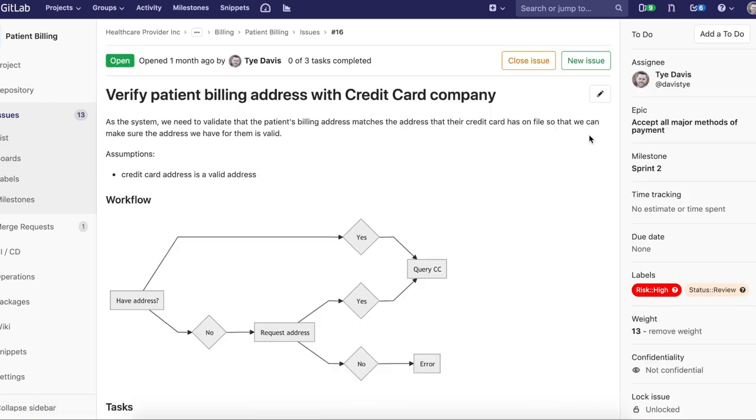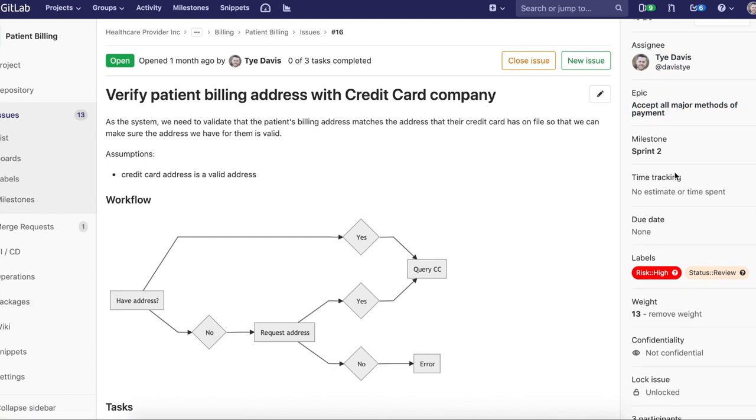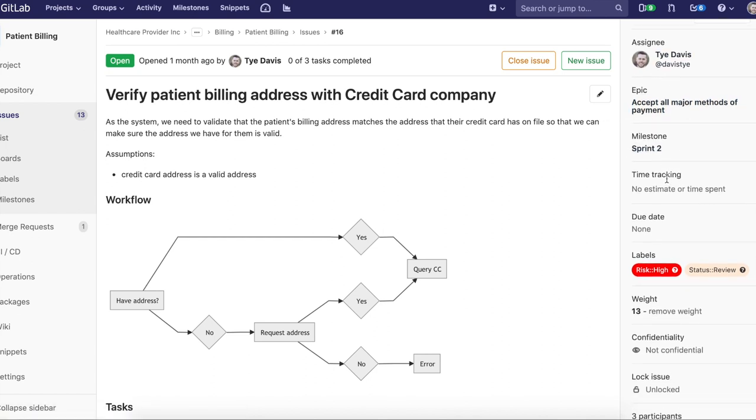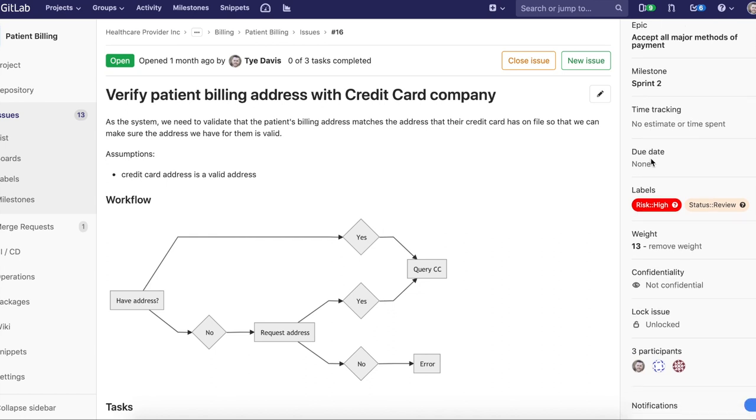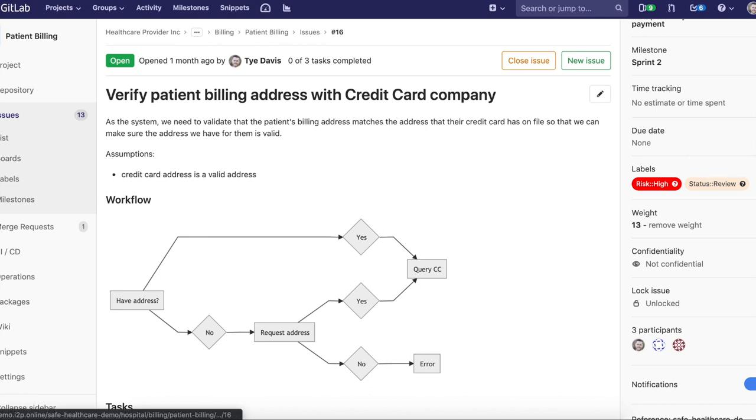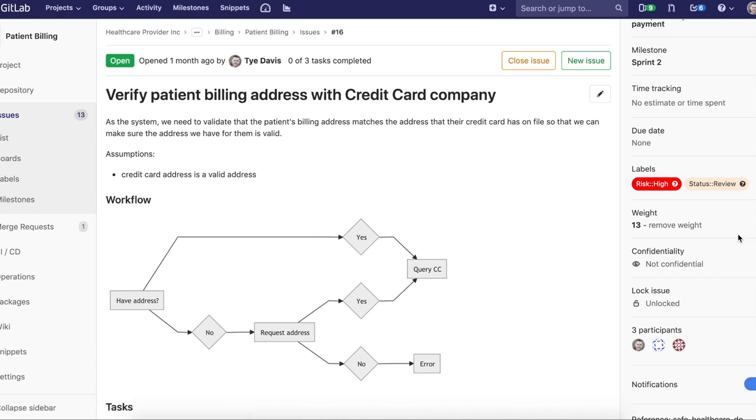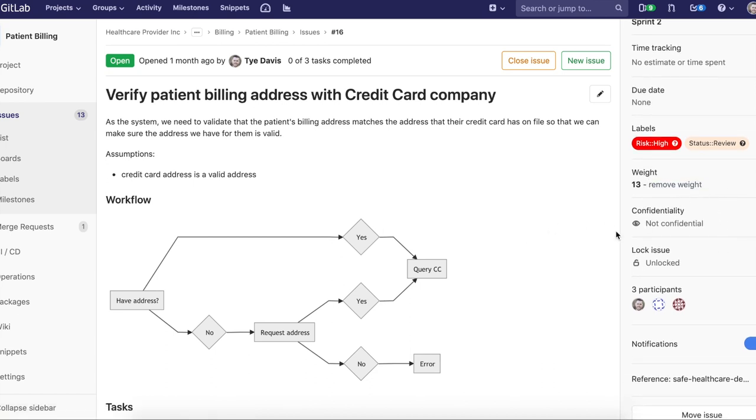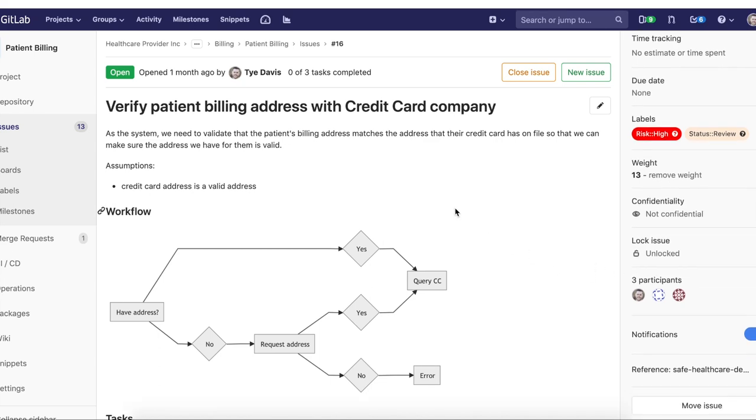Diving into a specific issue, let's see how the structure is built out with an issue. I can see on the right side here, we have the epic that it's tied to, who's it assigned to, the milestone that it's part of. You can add specific time tracking in here if you want to add some hours to give it a due date, labels that's associated with that, add any other labels. Maybe you're doing SAFe, it's part of an agile release train. And then the weight you can add in here, whether you're doing maybe like Fibonacci scale or card deck of cards, however you do that, you can add that weight in here. And then you have a few other options on the right.